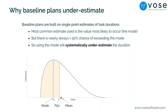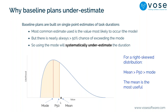The problem with those mode values is that, because we're trying to achieve a project in the shortest time and at the lowest cost, we're already pushing the limits. There aren't many things that can make the duration or cost much smaller than what we've planned. But there are many things that can go wrong and increase time and cost. So this distribution has a longer tail to the right — the distance from the mode to the maximum is much greater than from the mode to the minimum.